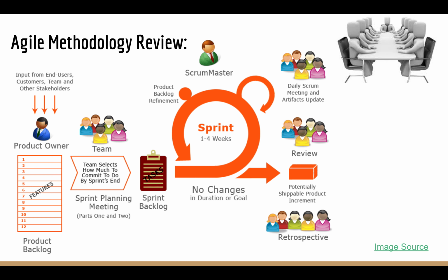The team that is involved then will perform some estimation in their sprint planning meeting, which usually includes some feedback from the product owner. Then we will assign some items to the sprint backlog, and a sprint is generally a 1 to 4 week duration of time where we commit to completion of these smaller pieces of requirements.